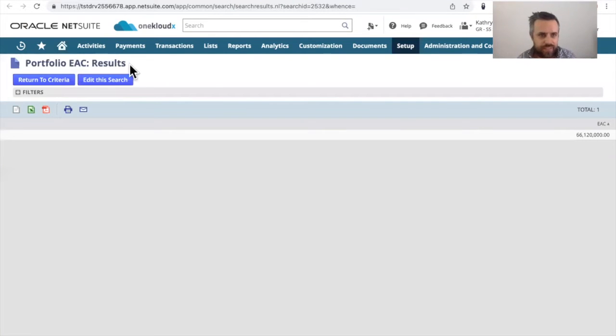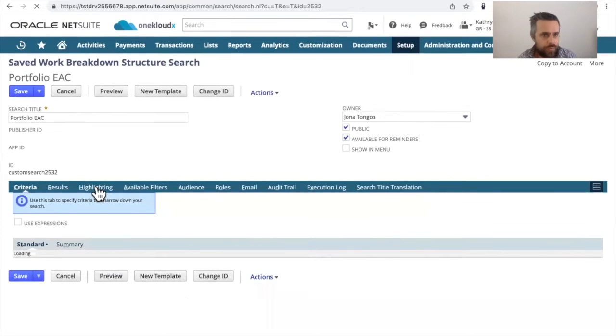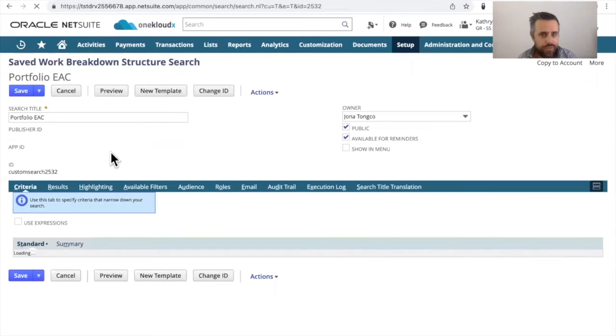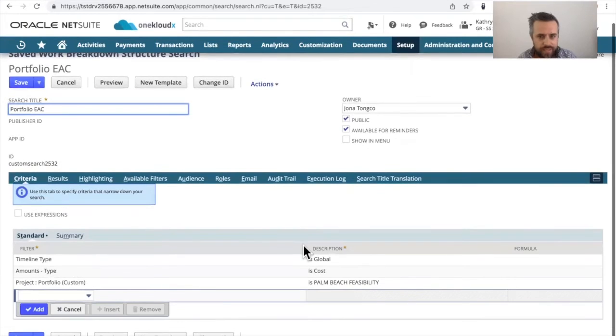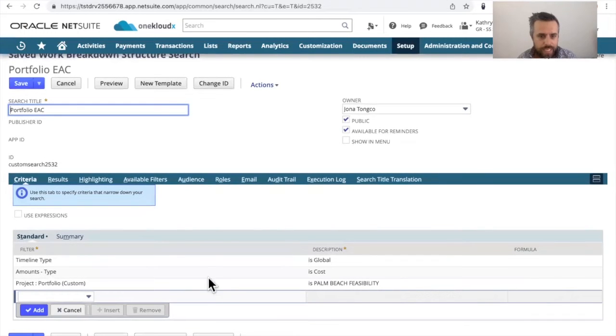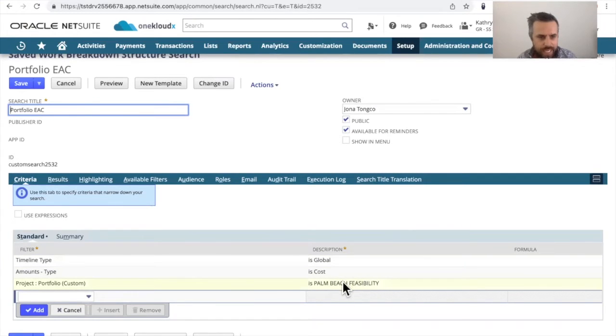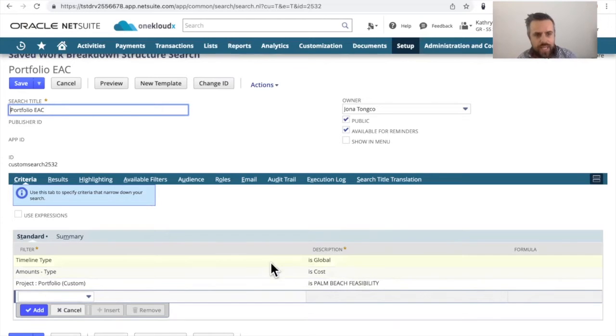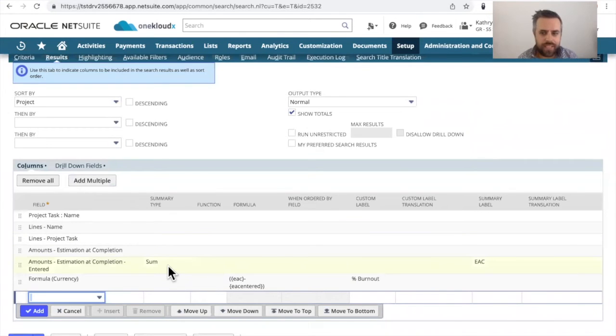It's just a very simple saved search report that looks at the total estimate to complete of an actual project, where you're looking at for a particular criteria of this is the project portfolio we're looking at, we're looking at costs as the amounts. And obviously the timeline type is global with an actual aggregation of the estimate at completion entered.